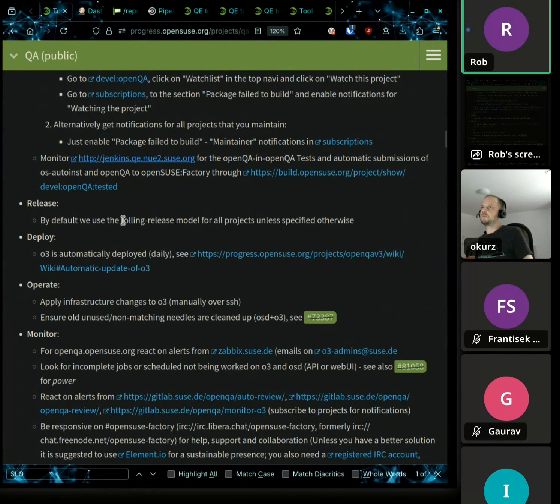We use a rolling release. So this is different to the regular Scrum time frame where after each sprint there would be one fixed release if the sprint was successful. But we have a rolling release. So for us, it's not that fixed time frame. And overall, we don't have those fixed timeframes in the same span as the regular Scrum process would.